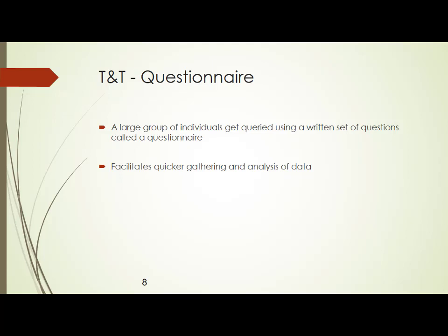So you understood questionnaires, you understood interviews, you understood facilitated workshops, and you understood focus groups. So these are all tools and techniques for what? Collecting the requirements. If you want to collect the requirements, you should have inputs ready with you. One is the project charter, and the second one is the stakeholder register. How did you know that you are going to send the questionnaire to the operator? Because operator was one of your stakeholders which was mentioned in the stakeholder register.